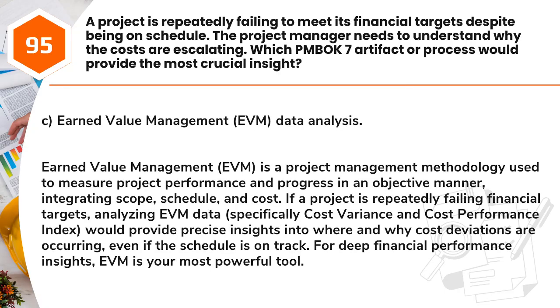Answer: C. Earned value management, EVM, data analysis. Earned value management, EVM, is a project management methodology used to measure project performance and progress in an objective manner, integrating scope, schedule, and cost. If a project is repeatedly failing financial targets, analyzing EVM data, specifically cost variance and cost performance index, would provide precise insights into where and why cost deviations are occurring, even if the schedule is on track. For deep financial performance insights, EVM is your most powerful tool.